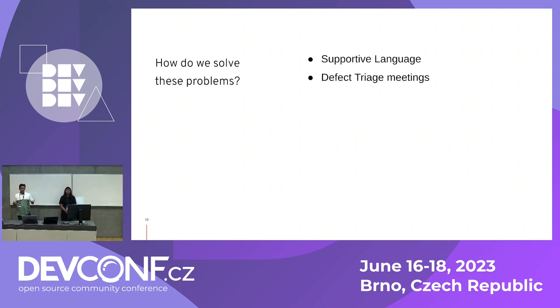Okay, so the second one is the defect triage meeting. We follow this every week. Bugs come from many places: the tester, the developer, multiple places, and the customer also. So every week we hold one meeting. In that meeting, we discuss the priority, whether it's a bug or not, and what the solution is. We provide the basic things in the ticket too, and the story points, like the difficulty level of those bugs.